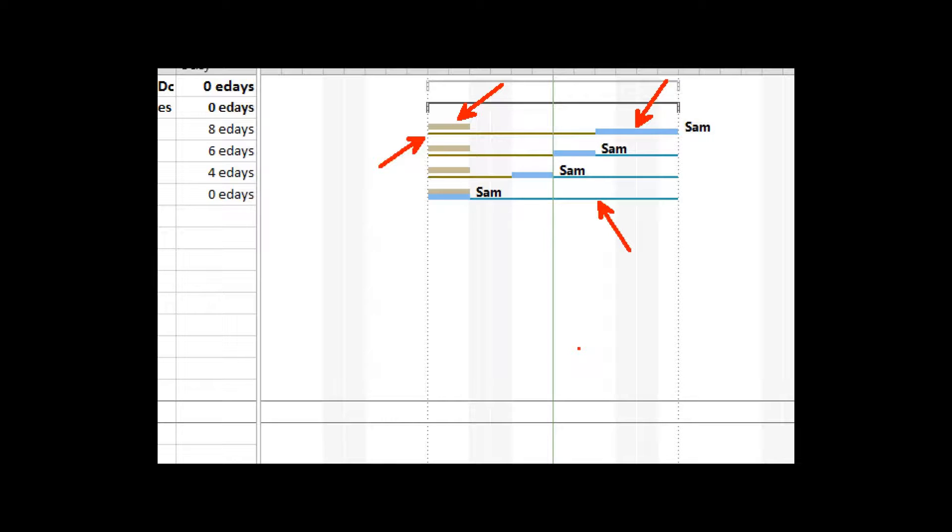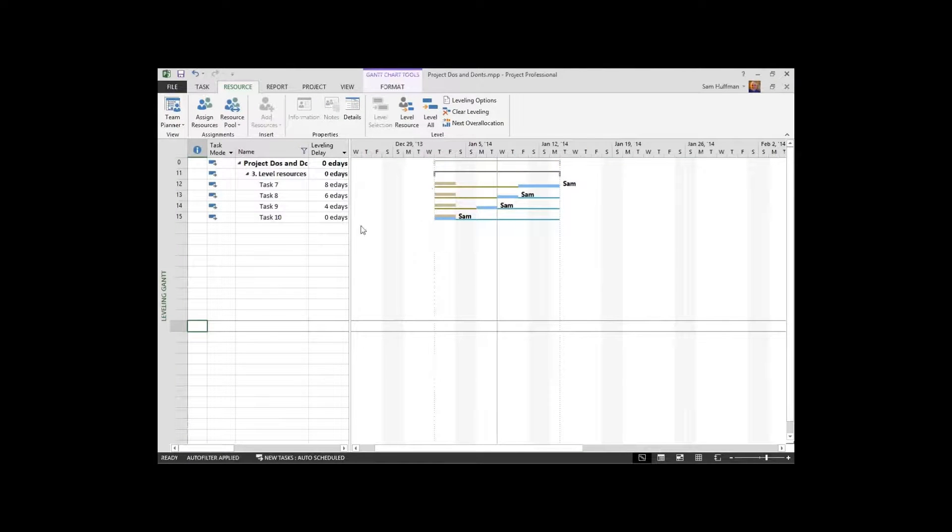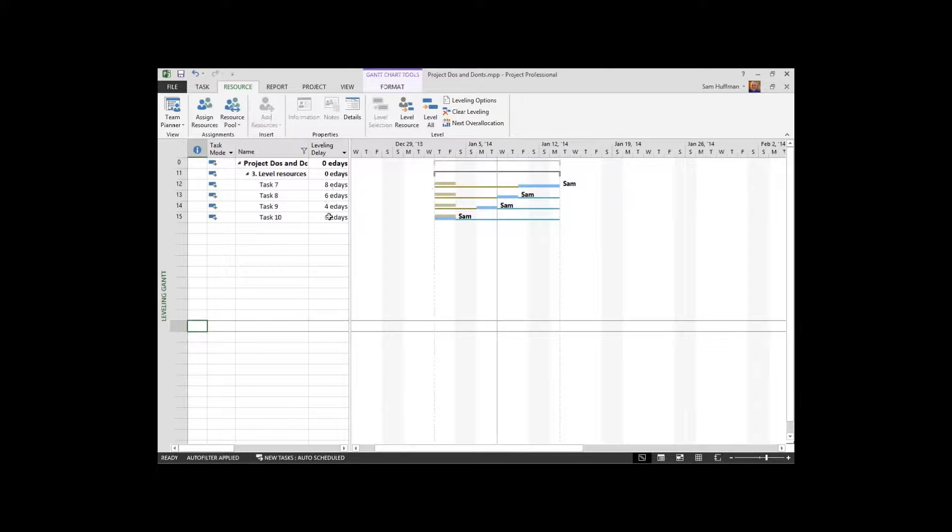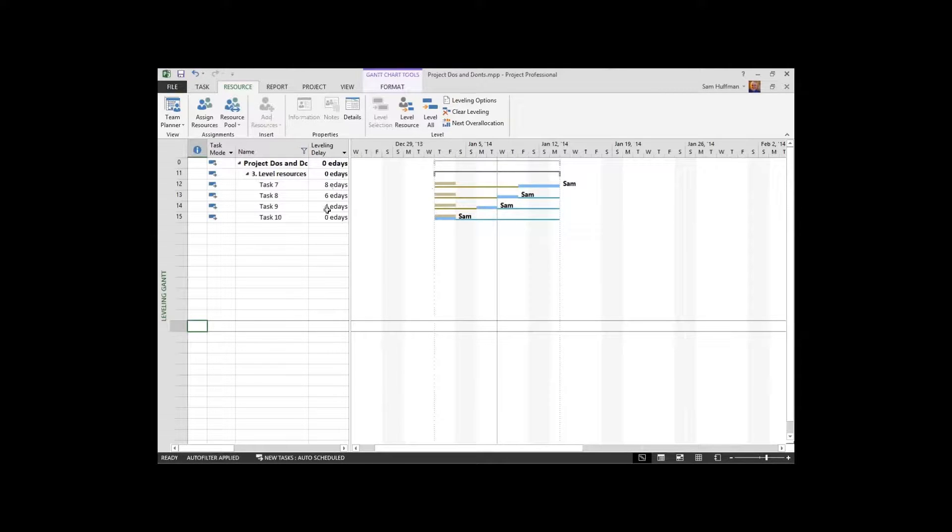And this little tiny bar on the back is telling you how much farther a task can be delayed. How much further it can be delayed in your timeline. So you're getting a snapshot here of what happened when you leveled your project. So in terms of schedule and in terms of delay. It's called the leveling Gantt, I encourage you to have a look at this. Now notice also that the leveling delay field is represented here showing you how many days tasks had to be delayed in order to accommodate.